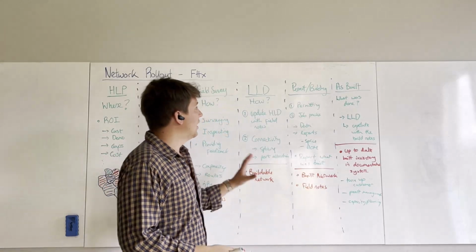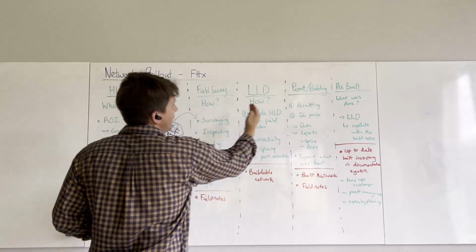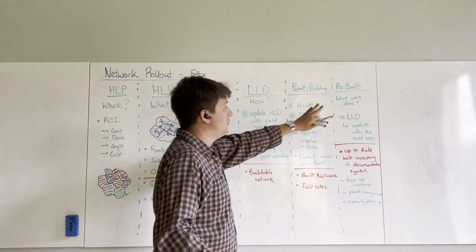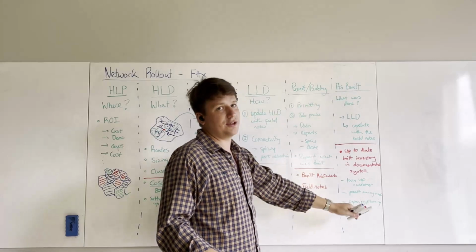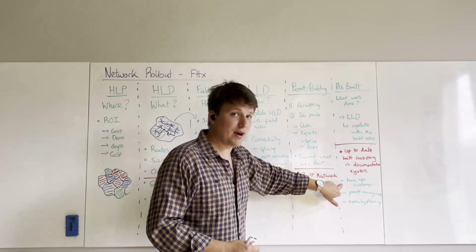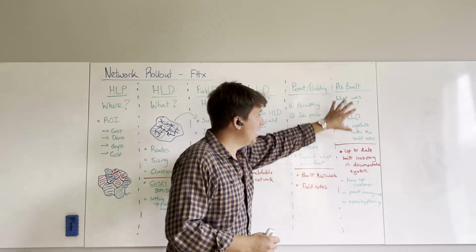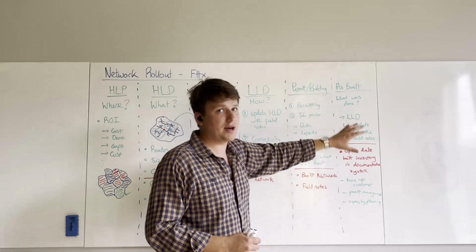A lot of companies are rushing as quickly through this phase, these first 1, 2, 3, 4, 5 phases. They're not focusing effort on this because it's sort of seen as a cost at the moment. But in the next years, as we move into generating revenue, as we move into having to actually turn up customers and manage their networks, if you've not done this, you're going to see much greater costs down the line